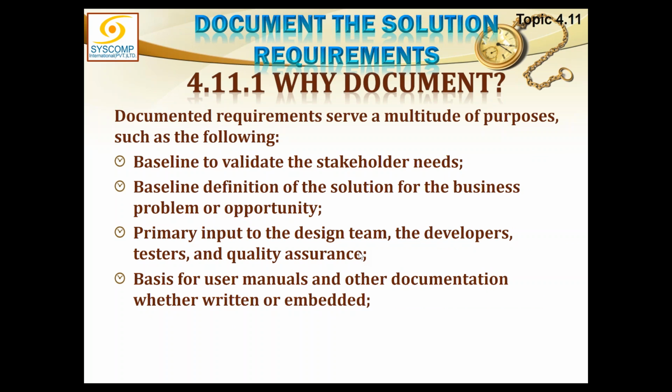Why do we need to document it? These documented requirements serve a multitude of purposes, like a baseline to validate the stakeholder needs. We are going to freeze the requirements we have elicited and analyzed. Naturally, we have obtained approval from the stakeholders already. They have agreed on the requirements we have created. So we have to baseline that and let the stakeholders know that this is the final version on which we are going to now develop the solution. It also serves as a baseline definition of the solution for the business problem or opportunity. So the scope we are establishing is also baselined accordingly.